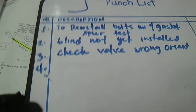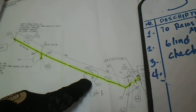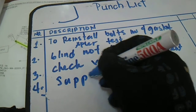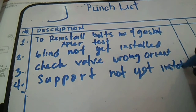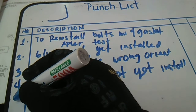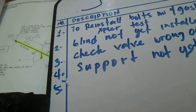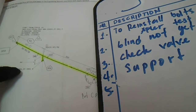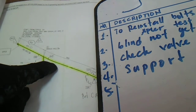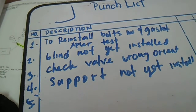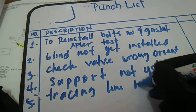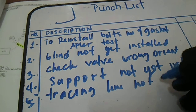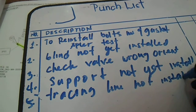Number four: we have a support here — support not yet installed. This is a welded type support, and there is a pipe shoe and guide also. Number five: we have a tracing line here — this dotted line is a tracing line — and the comment is tracing line not yet installed, to be installed after test.